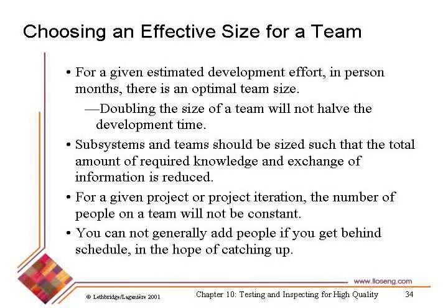One of the things that's well known, a well understood piece of software engineering wisdom, is that doubling the size of the team will not help you get your work done faster. Okay? So let's say that I have a project and I have 3 people and it's going to be delivered in 6 months. And I say, okay, well, I'm going to have 6 people and I'll get it done in a month and a half.